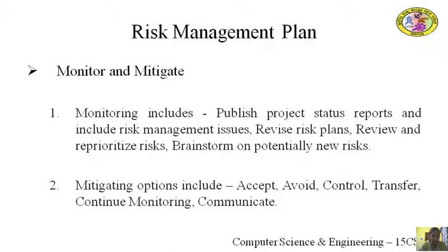Avoid: adjust project scope, schedule, or constraints to minimize the effects of the risk. Control: take action to minimize the impact or reduce the intensification of the risk. Transfer: implement an organizational shift in accountability, responsibility, or authority to other stakeholders that will accept the risk.